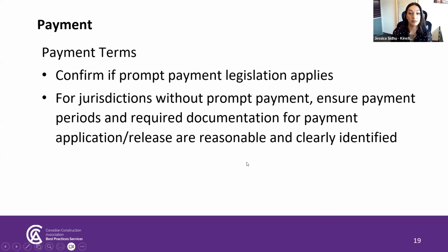So on payment terms, whereas net 30-day payment cycles used to be commonplace, payment terms are increasing towards a net 60-day or greater cycle. This can impose a significant financial burden on contractors, especially when owners refuse to provide adequate payment security. So improved payment terms and clear owner commitments to pay, which would include guarantees from balance sheet entities, are necessary to ensure that contractors can effectively manage credit risks.